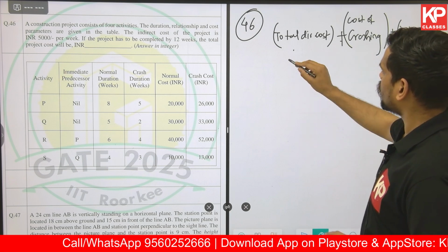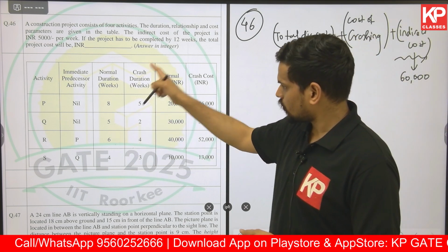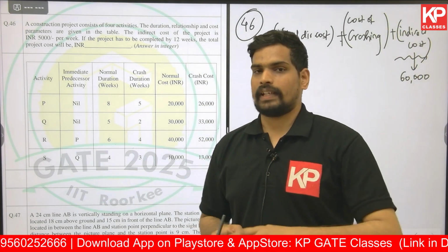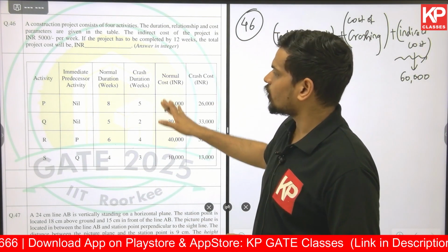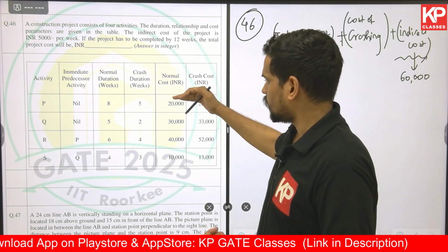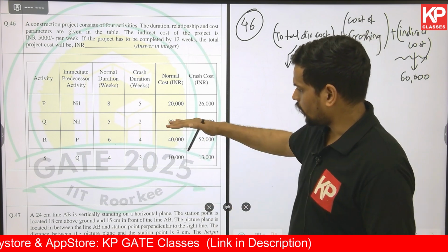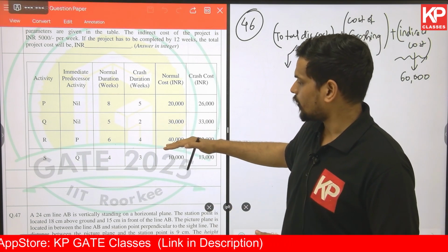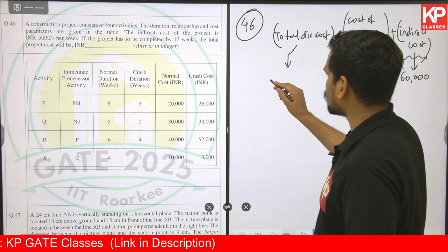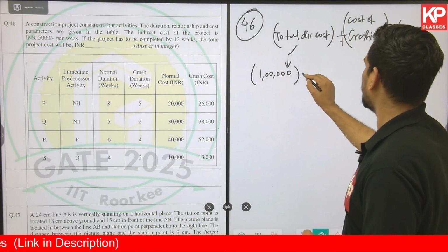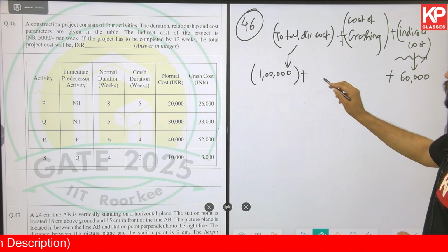You need to find out the total direct cost for the complete project. For any project to complete, you need to complete all the activities. So what is the total normal cost of all the activities of the project? That is called the total direct cost. So it will be 20,000 plus 30,000, that is 50,000, plus 40,000, that's 90,000, plus 10 more thousand, that's going to be 1 lakh. So the total direct cost is 1 lakh. So 60,000 is indirect cost.